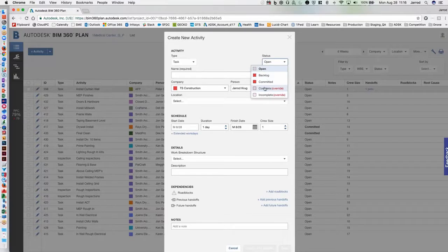In true fashion, what we do in the last planner methodology is, as I said, every task comes in open. We gain consensus and commitment from the team. Usually those are in a weekly work plan session. Those are typically Monday or Tuesdays. We go around the room, and I've seen this done with the superintendent orchestrating this in the trailer with the PE really doing all the legwork in the environment. And we complete those, if they are complete, that next week, or we incomplete those. And that's really what happens when we get into selecting that root cause, and I'll show you what that looks like.